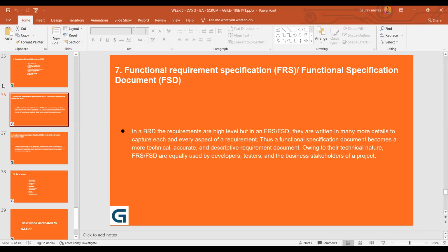Okay. So if you're a senior business analyst, first of all, your document will be reviewed and approved by your team manager or team lead. Okay. In case of Agile, it should be your Scrum Master. Okay. Post Scrum Master, it will be reviewed and approved. Reviewed and approved means they read it, they try to ensure that whatever the customer had mentioned is there, and it is properly mentioned with all the required inputs which are beneficial for the developers to go ahead and develop.